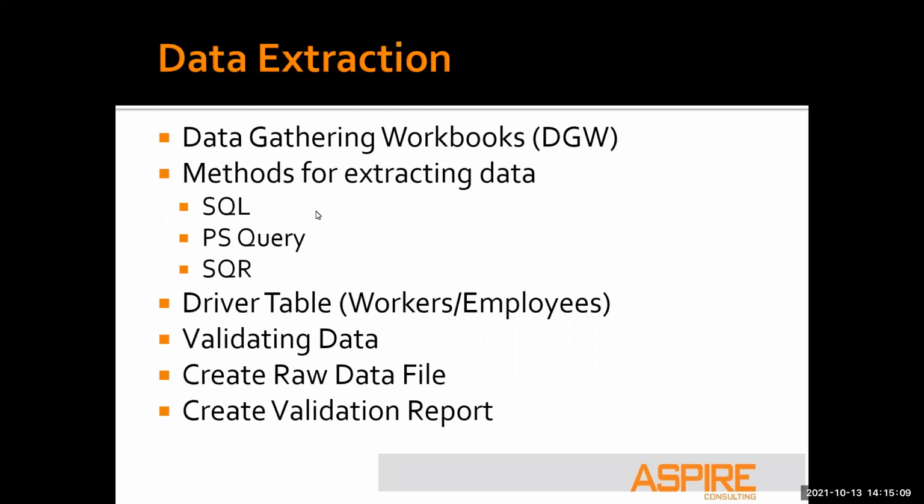So going into data extraction, one thing I guess I didn't point out earlier, as a client that will be converting from PeopleSoft to Workday, in every case that I've been involved in, and I believe is pretty much true in every implementation of a Workday environment, you'll have an implementation partner. That implementation partner should sit with you, whether it's the functional team, whether it's your technical team, or both, and walk through what data needs to be converted. And that's all managed in what I've always referred to as data gathering workbooks.